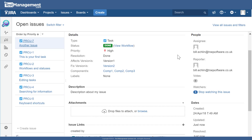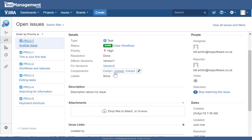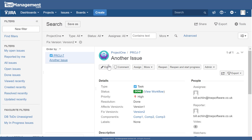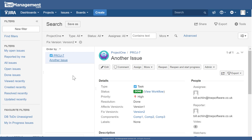With more complex workflow and state transition models in Jira you can enforce the setting of these fixed version and affects version fields, forcing users to capture them. With this basic default workflow configuration the fields are optional. Just as you can click a component value to search issues by component, clicking 'Version 2' takes you directly to a list of issues where the fixed version is version two — making it easy to see what's going into a particular release.